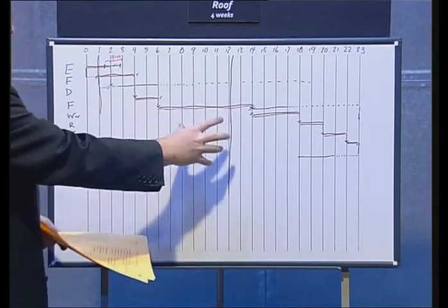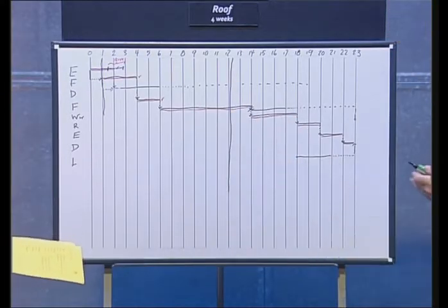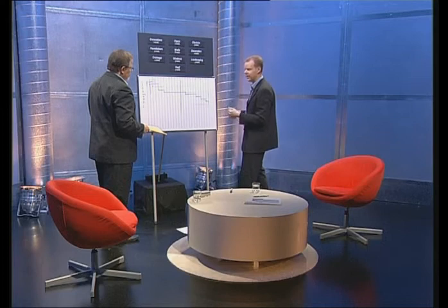Right, so that's the benefit of using a software package rather than doing it this old-fashioned way. Presumably you still have to build in the same model into the software package, but after then it pays dividends. Exactly. To plan this project, you would do it exactly how we've done it and add 15 minutes on it to load it into a software tool. The benefits come when you are monitoring and controlling your project and having to make changes, because you can very quickly change the durations of activities and see how that affects the subsequent activities in your project. Obviously, it's very easy in this example. Projects that we run typically might have 200-300 activities, and very large projects, 2,000 or 3,000 activities.